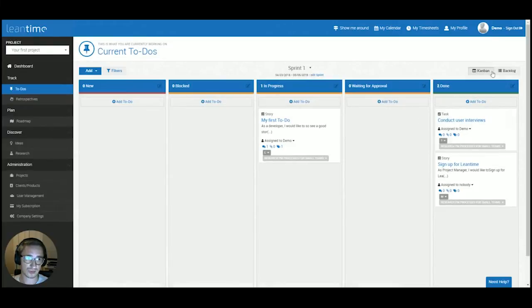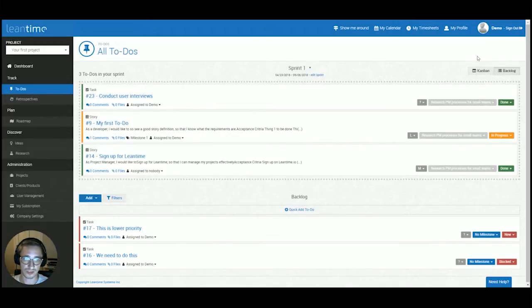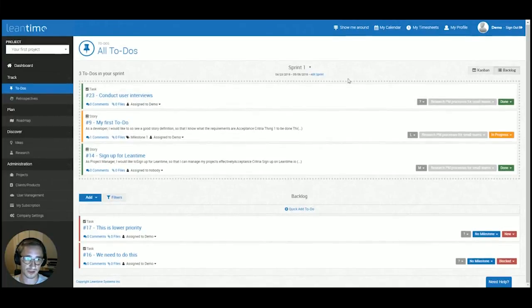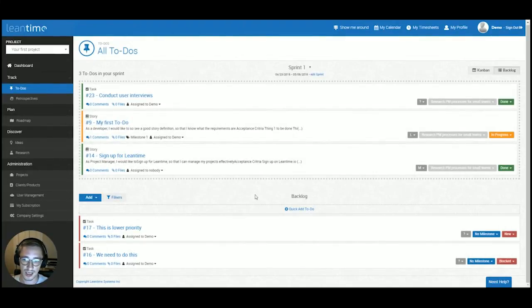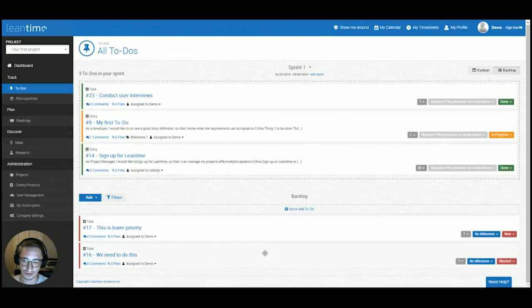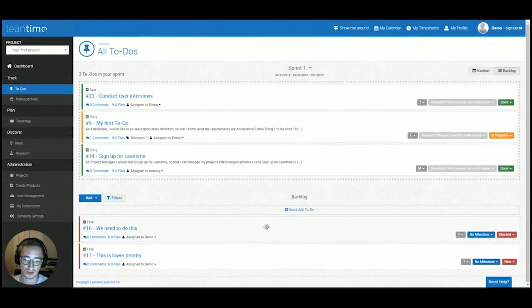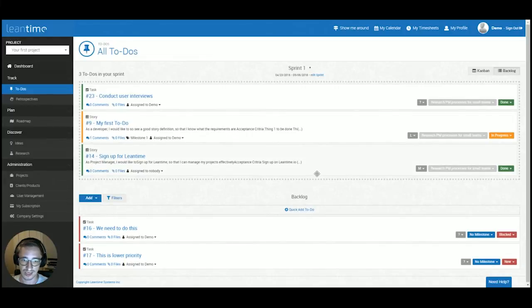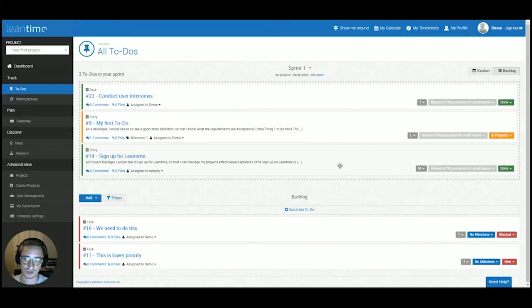Going back to the to-do section, you have two different options to view your tasks. There's the Kanban view and then there's the backlog view, which will give you a list overview, a prioritized list overview of your tasks. And this also allows you to drag and drop each of those tasks to reprioritize your backlog so that your highest priority items are always on the top of your backlog and you know exactly what is next on your list that needs to be done.